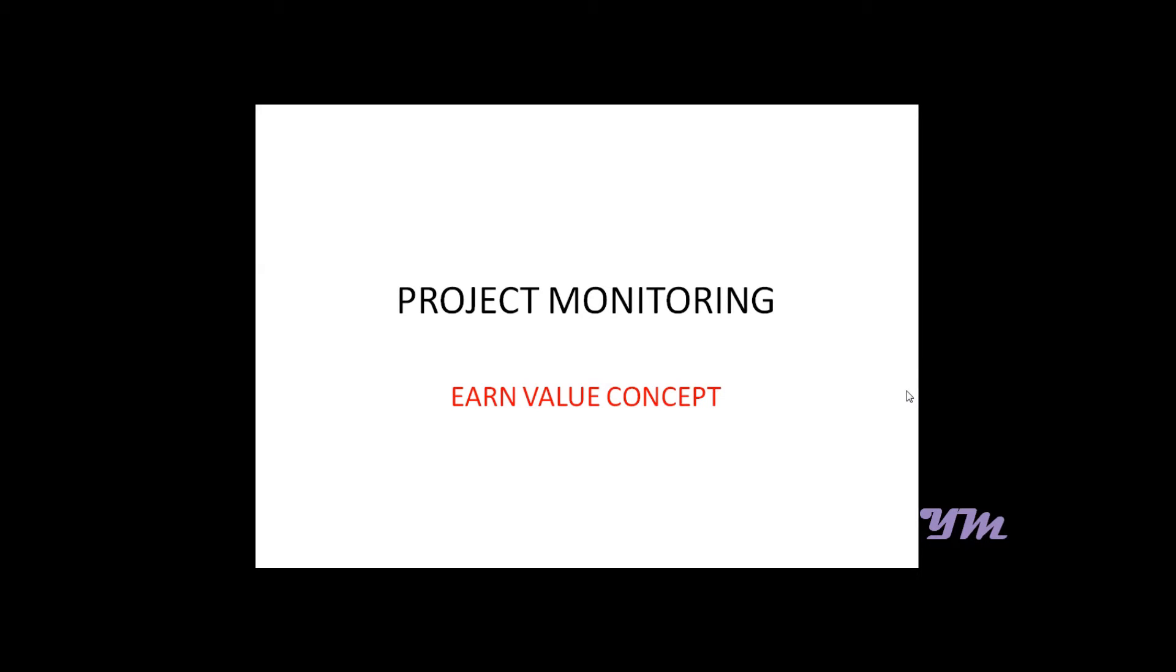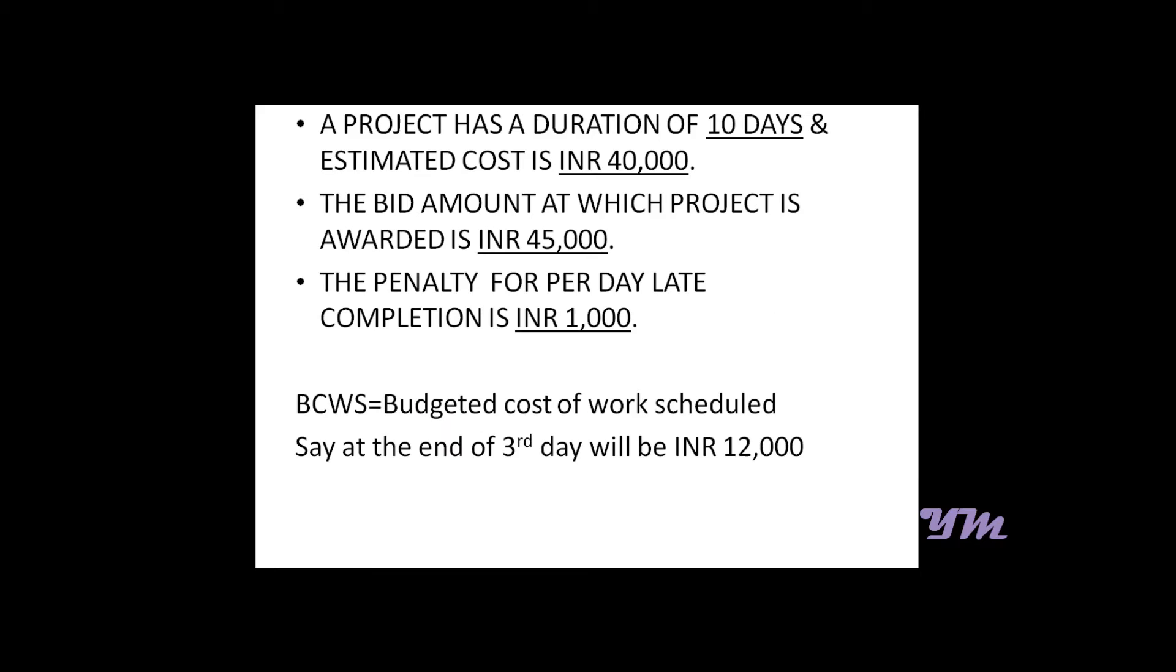Module 13: Project Monitoring Using Earned Value Concept. Say you have a project with a duration of 10 days, an estimated cost of 40,000, and the bid at which the project was awarded is 45,000. The penalty for per day late completion is rupees 1,000, so the profit margin is rupees 5,000.